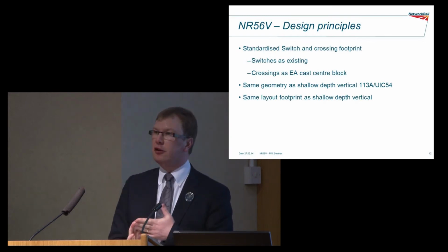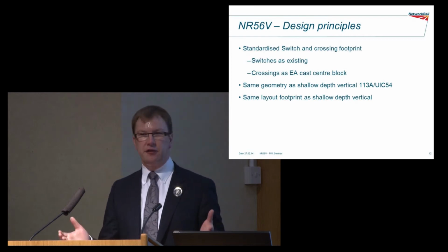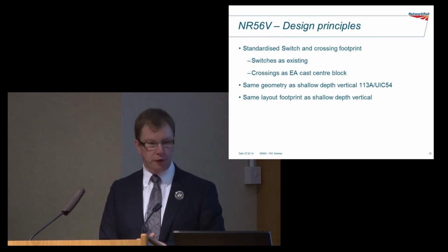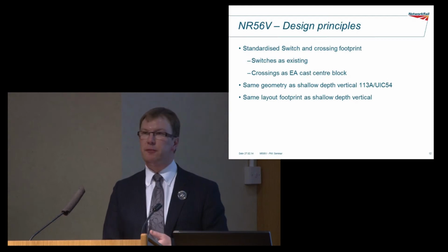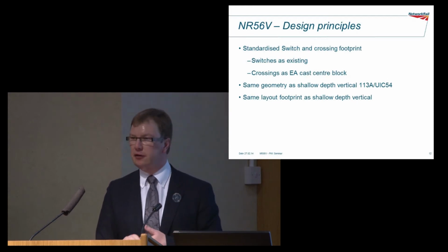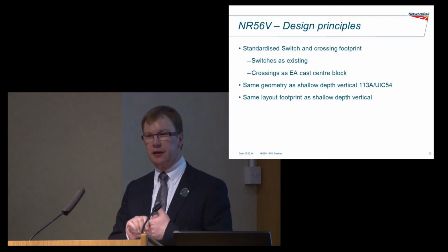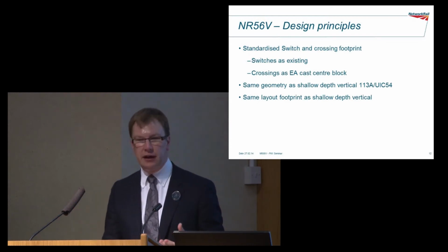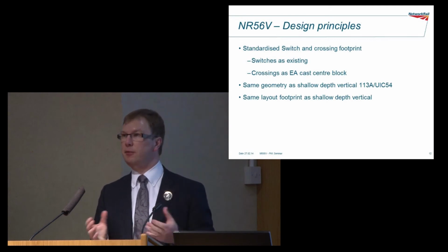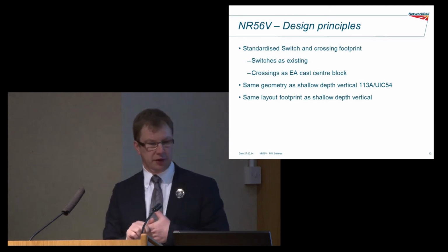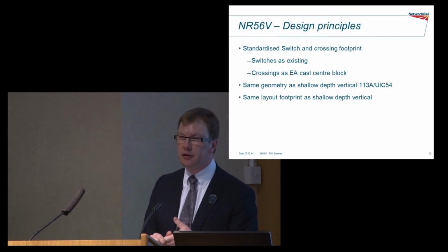We've standardised on the crossing footprint. As I say, through history we've ended up with a range of different footprints. And this really has given lots of problems in maintenance. We get occasional tales of woe where someone's ordered a crossing, they've got into their possession on Saturday night and it won't fit. Very, very few and far between, but it does happen. So we've taken the opportunity here to standardise on one.